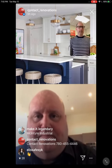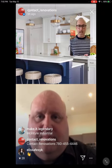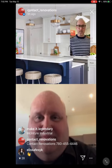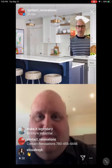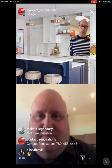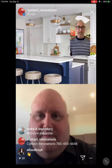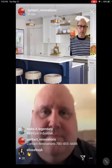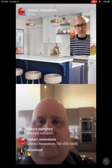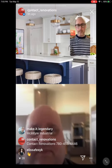Right. But there's nothing worse than someone coming up and their budget is a hard 40K and they come back to us with a $65,000 design. That's where I think it's important that the contractor and the designer communicate well, and keep the cabinet maker in the loop, because some of the little features you're asking for, for example those pull out storage units, are an easy $1,000 a pop to add in. Yeah, a thousand's easy.